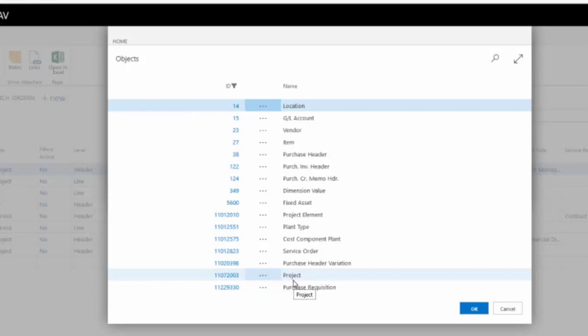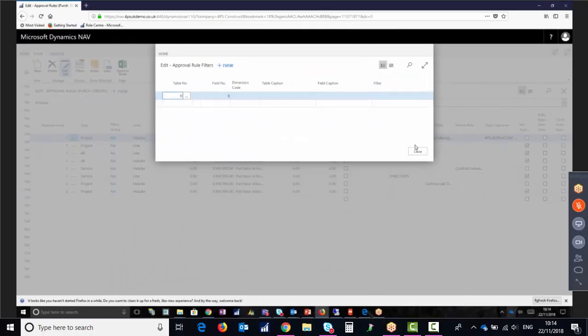filtered set of criteria. So if you're buying from a particular supplier and you know that particular supplier is a highly technical product that you buy from them, you can set a bunch of rules in there that requires more approval than if you're just buying aggregates or cable or something that you basically just go and buy and you can think about it later. Okay, so those rules get applied in those filters.